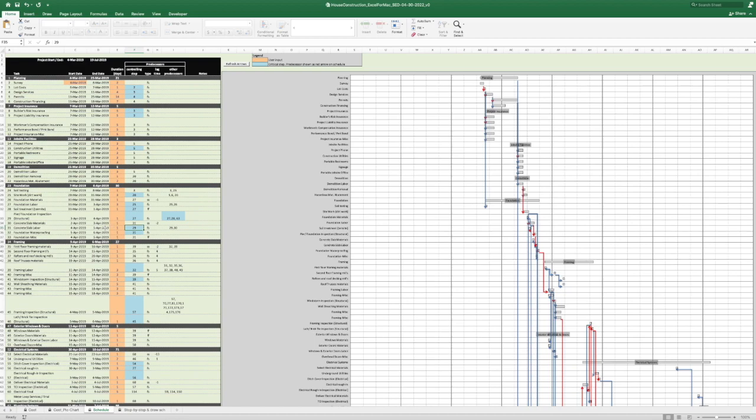But say that you wanted this task number 31 to be dependent instead of on item number 29, you wanted it to be dependent on item 24. You can change that. You can change this row right here, and it will update what it's depending on before it's going to start. So what I'm describing is a Gantt chart, and these are some common terms that are used and the common structure of how it is set up, where it's depending on a certain task to be completed before it starts another one.